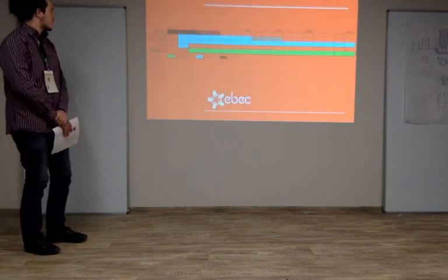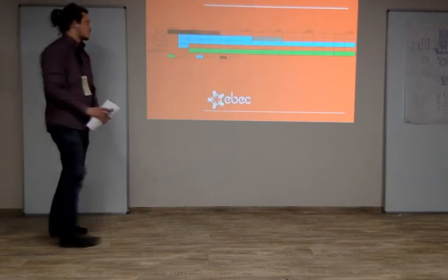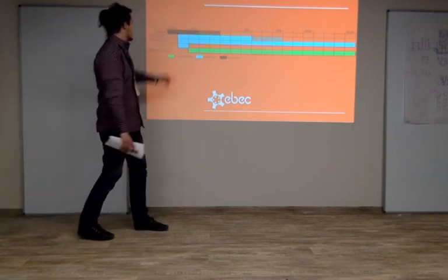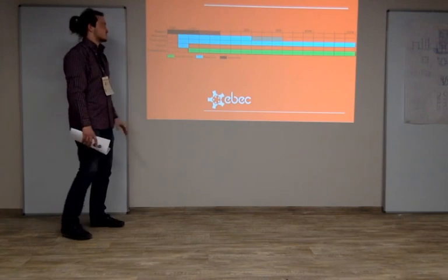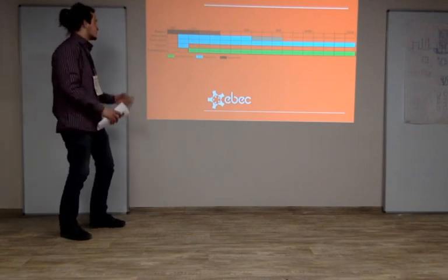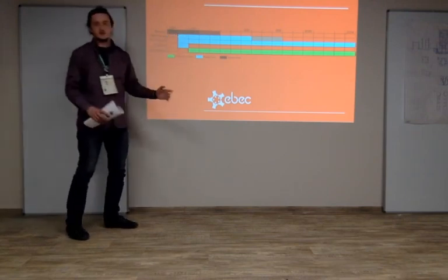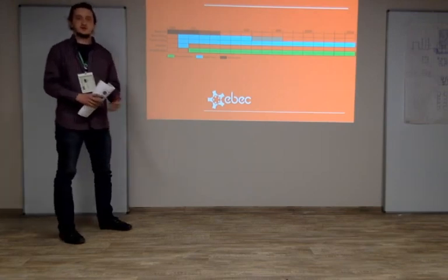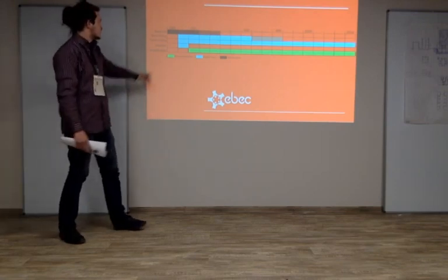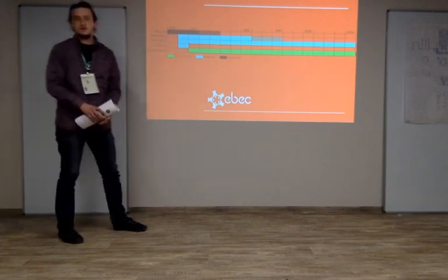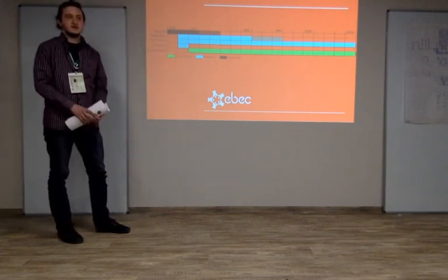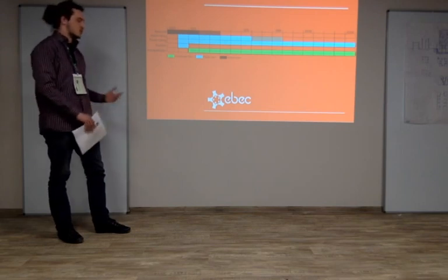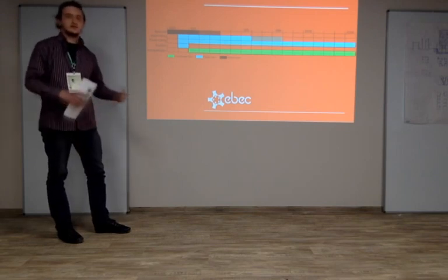So, next. The Gantt chart was made for the first 1.5 year. We started research. After some research is made, we can start advertising, letting people know of the danger. The fundraising, main fund income, it will be assurance companies that want the building to live on.